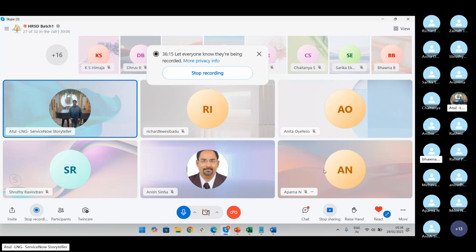Yes. So I'll answer the right question, but this question does not exist in the minds of a BPC or BA. Why are you even in a hurry? That is what I'm saying: when someone asks you, as a BA or BPC, do you conduct workshops? These things need to be defined. In my previous projects, we had 4 weeks for workshops only, a daily 3-hour workshop in 2 slots. Then we completed these workshops and everything.